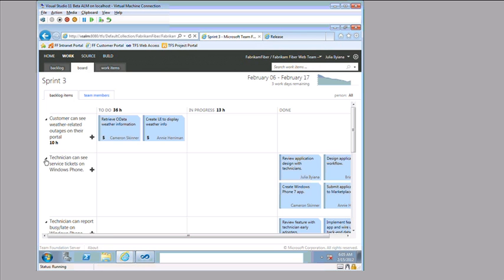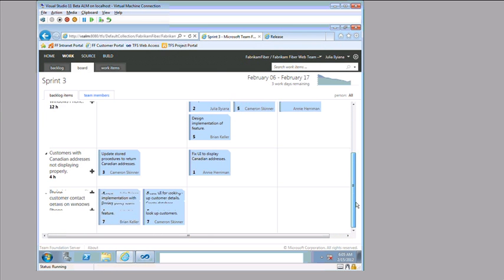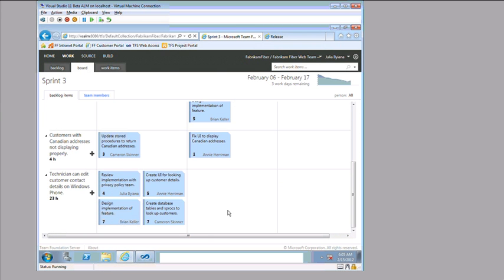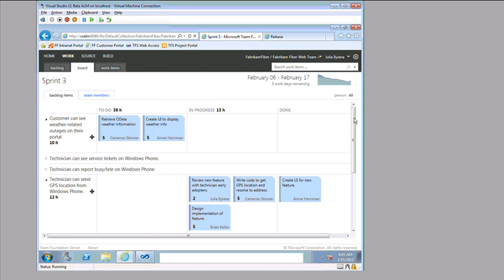So let's collapse down these done stories to get them out of our way. And now we can see that we've got one story in progress, two stories in progress, and one story that is completely not started. So we've got 23 hours worth of work here that is completely not started because the team's not going to start it until one or both of these stories is all the way done. That is an awesome practice because it gives us some flexibility that we need. I'm going to bounce back to the backlog very quickly, and then we'll come right back here and look at this board some more.